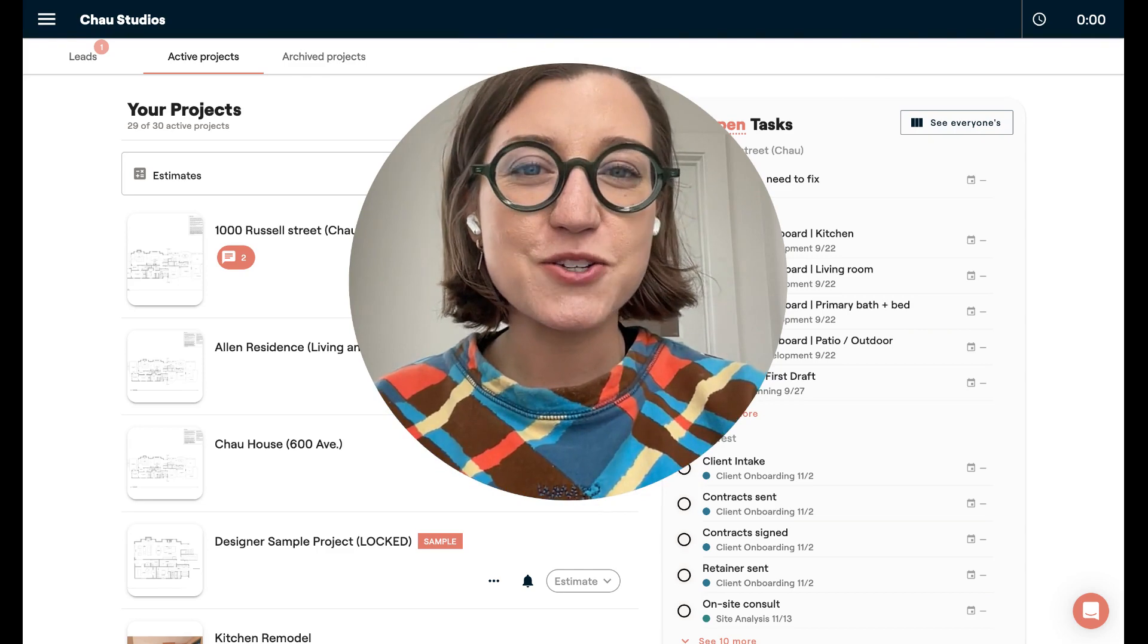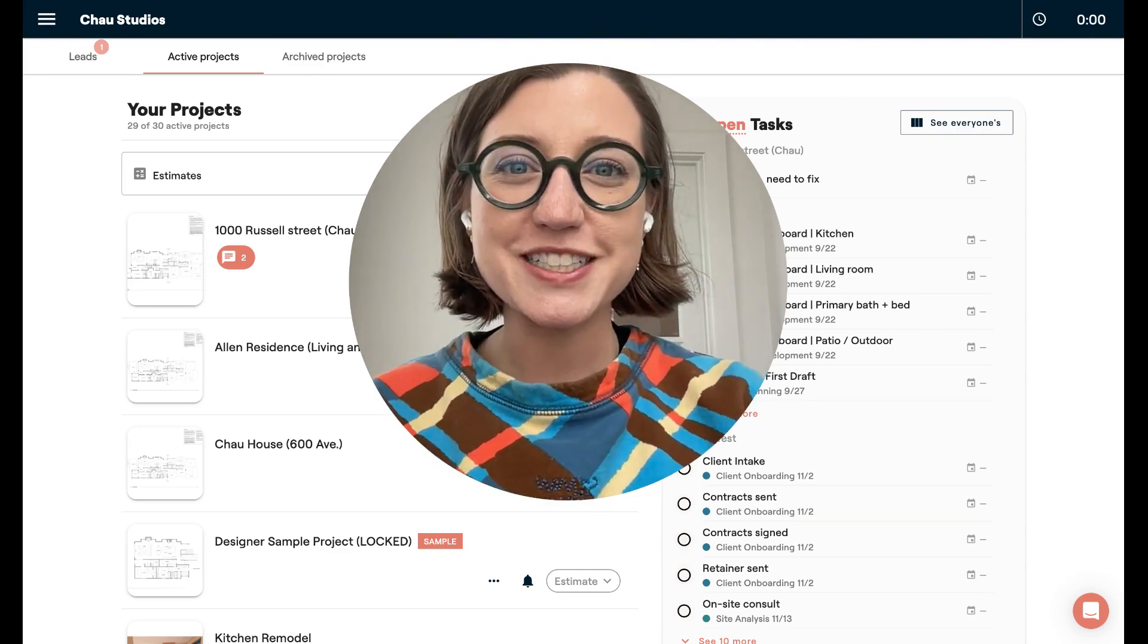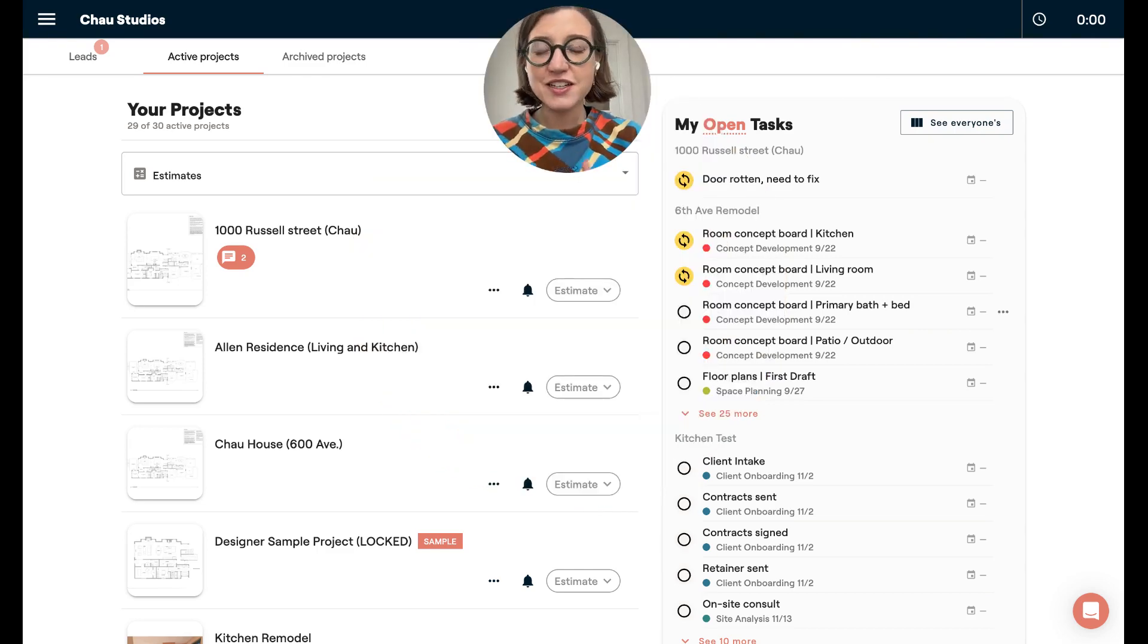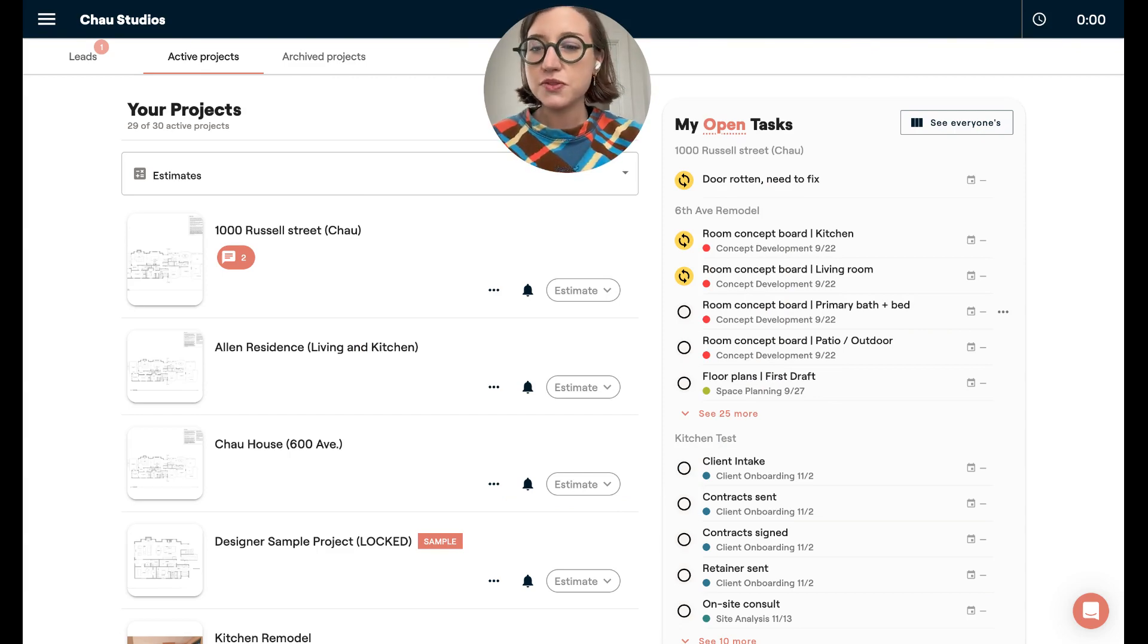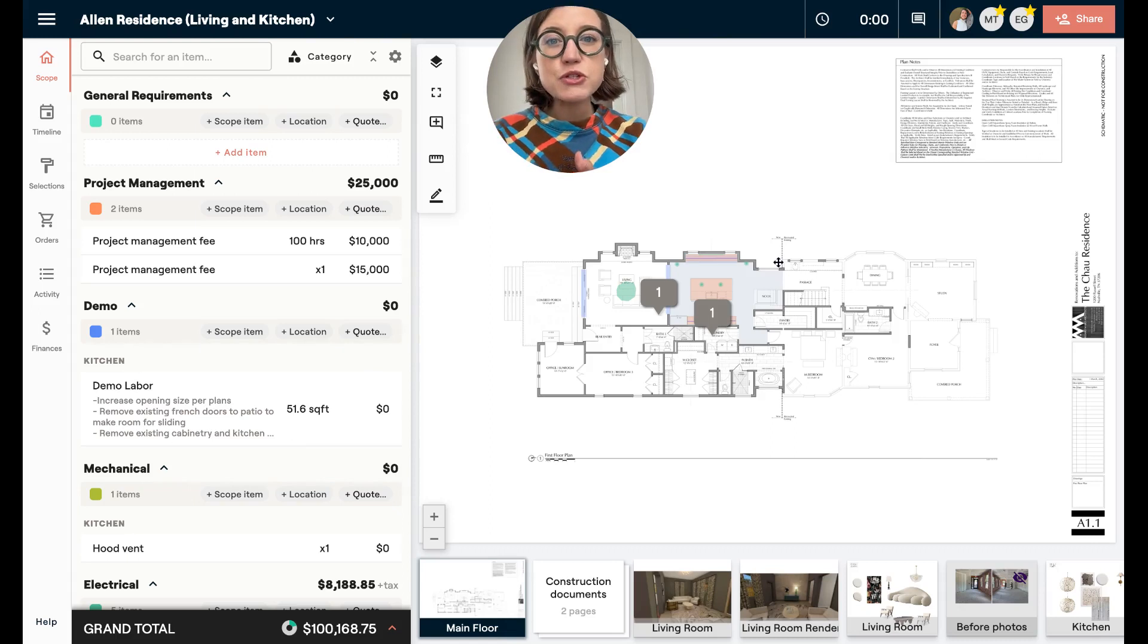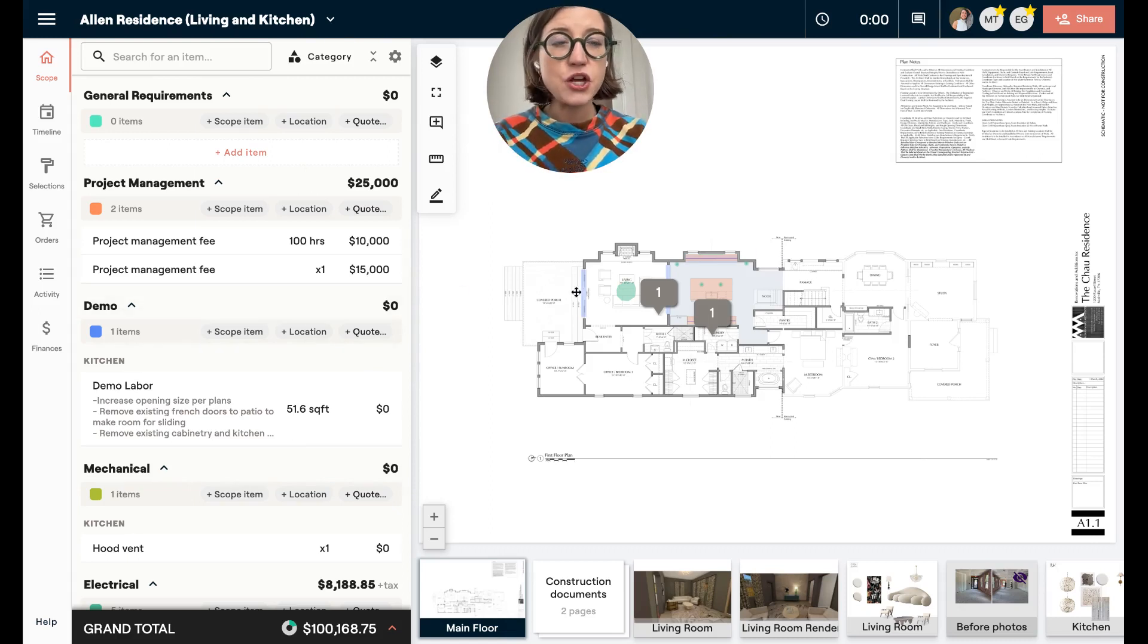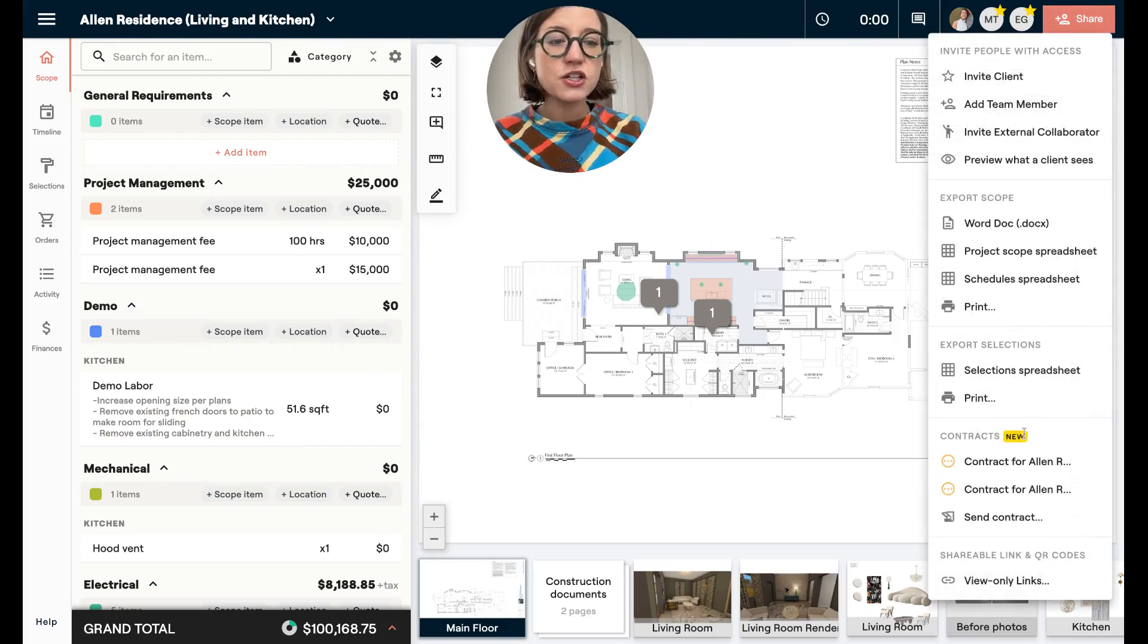So let's dive into sending a contract from your project. You're going to go to the project that you'd like to send a contract on. This is probably going to be a project that is in the estimation or proposal phase. Now, once you have your scope of work outlined and you have your project quoted or estimated, you're going to come to the top right and click Share, and then there's a new section called Contracts, and you're going to hit Send Contract.